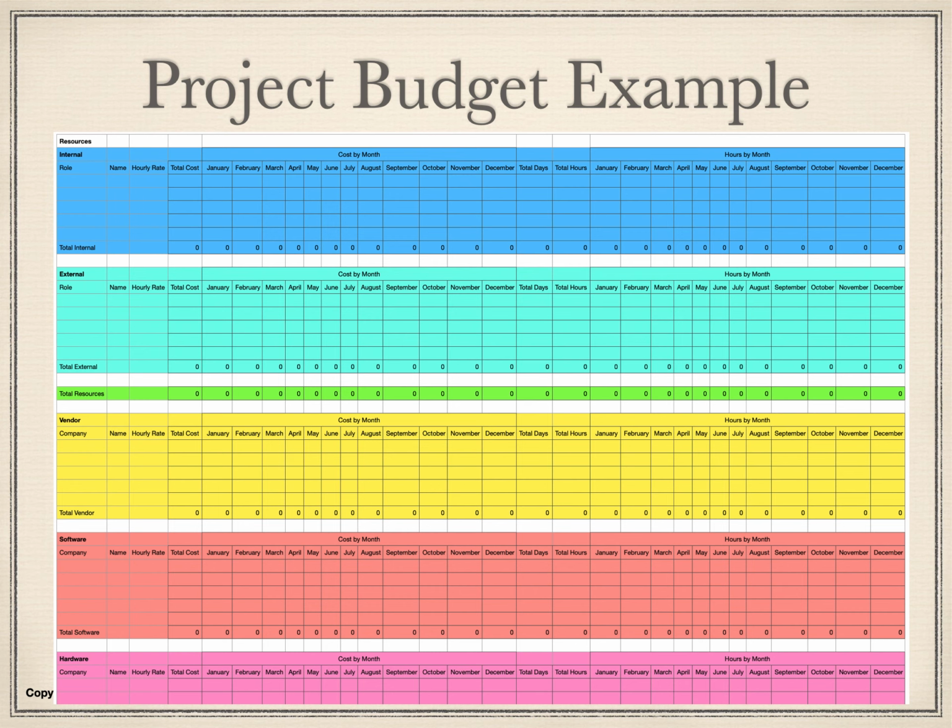The total budget per resource is available. The total budget per category is also available. The consolidation of this budget for all categories become the total budget for the project. This budget tracking sheet should be closely monitored on a monthly basis to record the actuals, accruals, and latest forecasts.